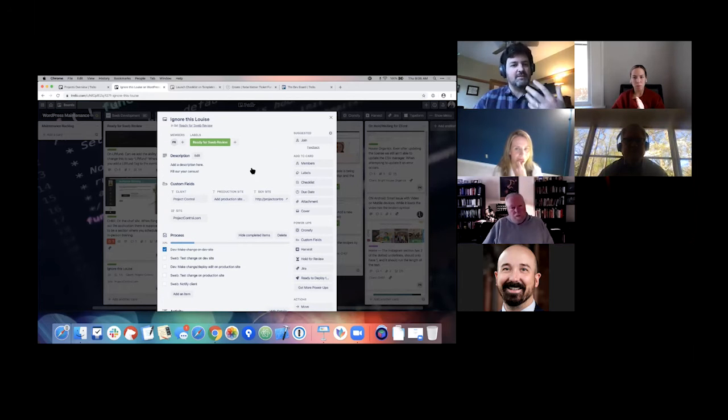So all of that happened as soon as I checked that box because we had set up some rules for the board, right? So we'd use BUTLER and said, anytime somebody checks a box that says, make change on dev site, we want you to assign it to Phil, put this label on it, move it to this list. And so it just removes so much friction from using the board for all of our team members, right?